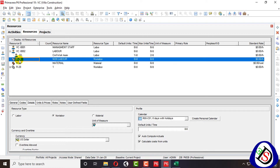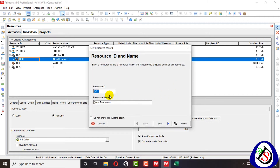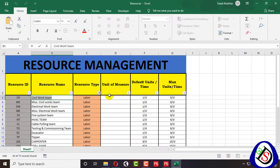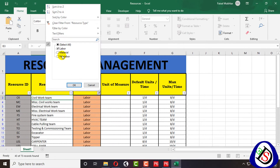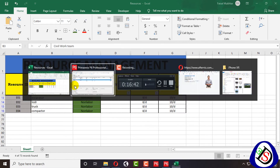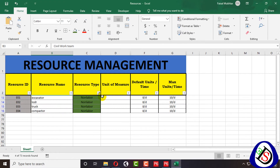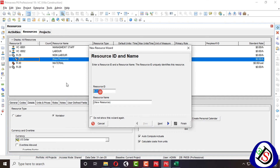Next I add a new non-labor resource. I select non-labor and the resource is an excavator. The code is E01. I click next, select non-labor, and set non-labor hours.